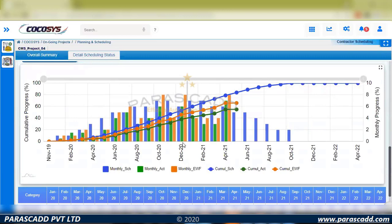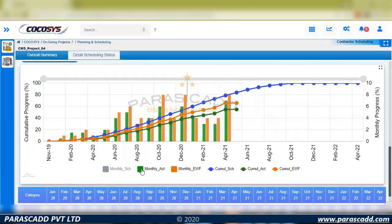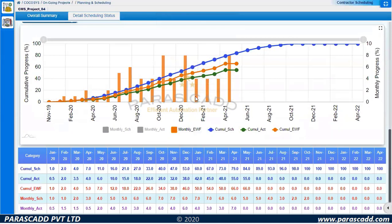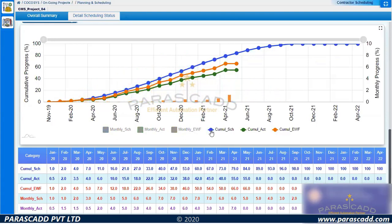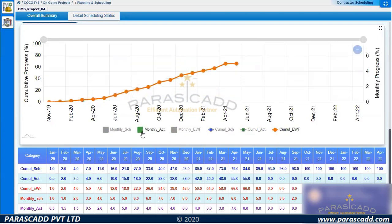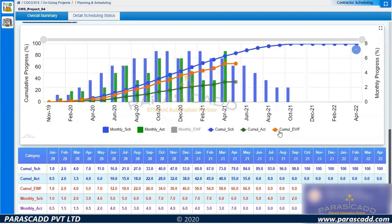This is for a civil tender — it could be piping work or brick work — and you can see this curve. It is a dynamic, real-time live curve. The bar charts show monthly schedule in blue, monthly actuals in green, and monthly effective work front in orange. The S-curve shows cumulative schedule in blue, cumulative actual in green, and effective work front in orange. Items can be hidden for flexibility and any combination of items can be viewed.